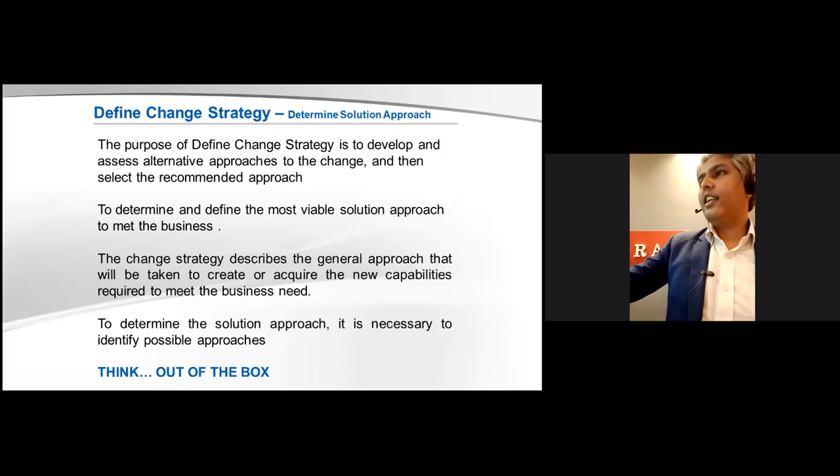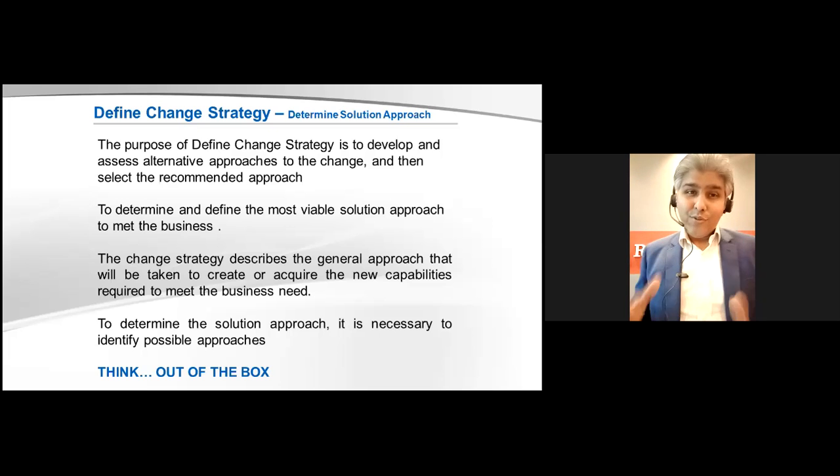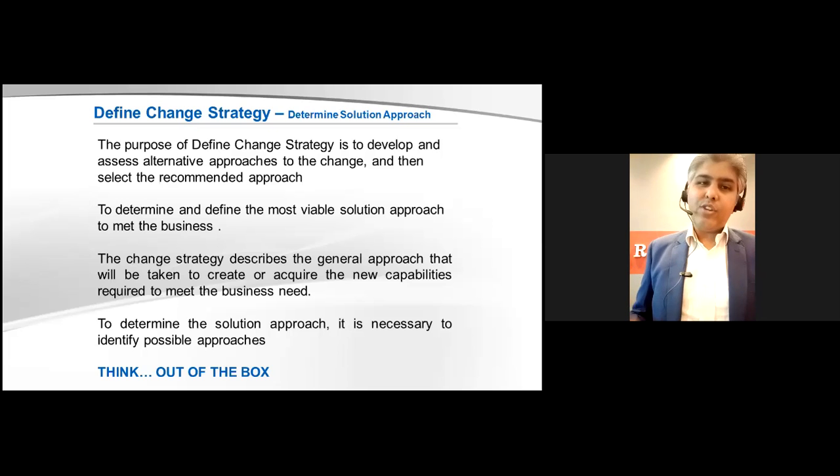Okay, how can we handle unknown risk? The first way to handle unknown risk is to identify it, to list it, to think about it. There will always be chances of something that you never thought about, and that's why 10-15% margins are always considered.